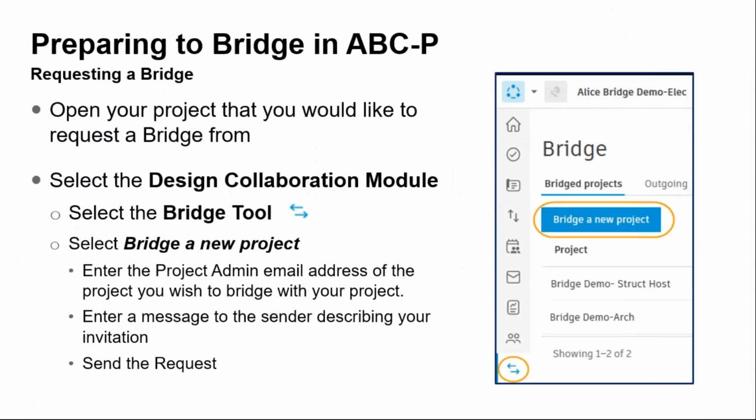Here are a few other tips. Before the exchanging of team data can take place, a bridge needs to be established between the projects. Since membership to each project is not required with BIM Collaborate Pro, an invitation needs to be sent and accepted to establish a connection between the projects.